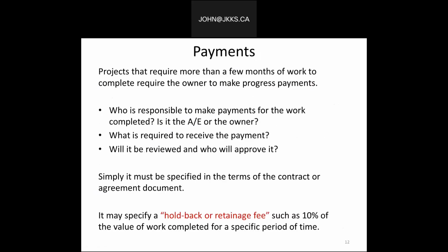On the next slide, if we consider these primary questions once again, we get back to the terms of agreement that must be defined in a written contract. As a contractor, who will pay me? What paperwork is required to get paid? What are the terms? Will it be monthly draws, or on demand? In other words, a clearly defined method and process for the payment. On projects that require more than a few months of work to complete, the owner often will be making progress payments.